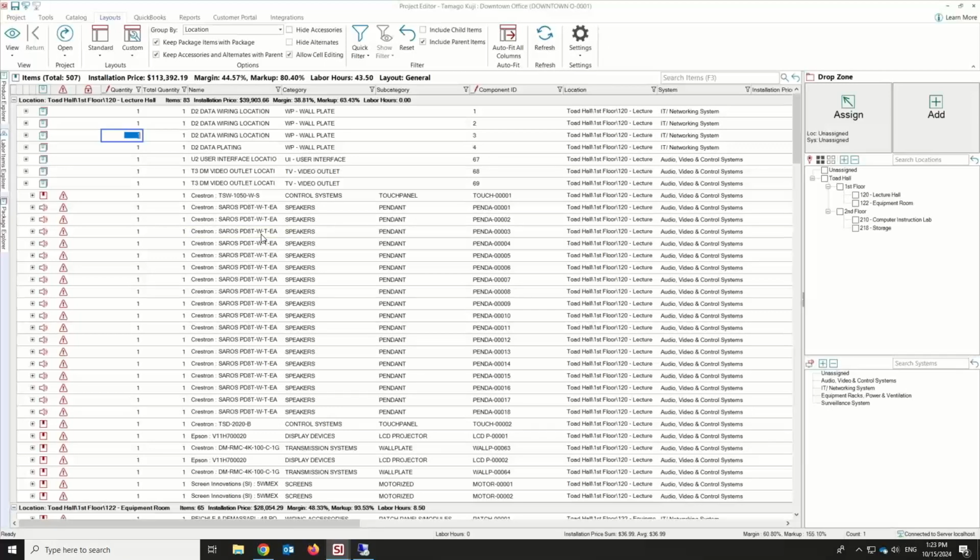But when you convert a quantity-based project to a unit-based project, which is the standard procedure for when you're going to break everything out into individual items, we will prompt you if an item has more than 5,000 as a quantity, hey, you might want to mark this as a bulk item, so we don't split that out into 5,000 individual connectors in the actual product, because you probably don't need a component ID for each one.